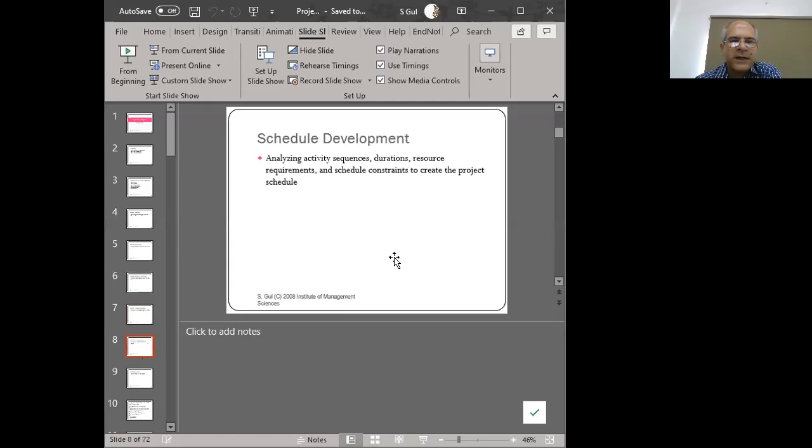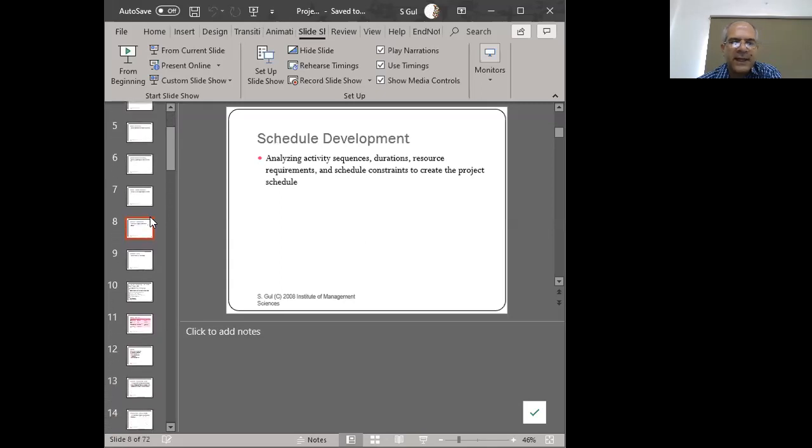Schedule development requires that we sequence out these activities and we produce basically our network diagram and then place that on top of the Gantt chart and put our holidays and our break times into it and the shifts that we've got running so that we can go from the amount of working days into the calendar days, right? So schedule development is this idea of actually taking your network diagram and developing your Gantt chart, which is your formal calendar days that are required to produce your project.